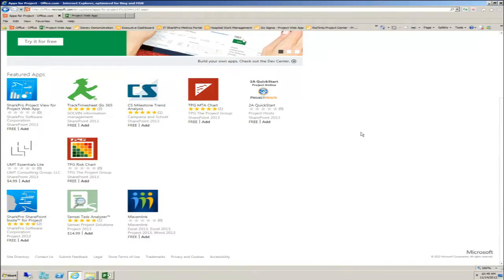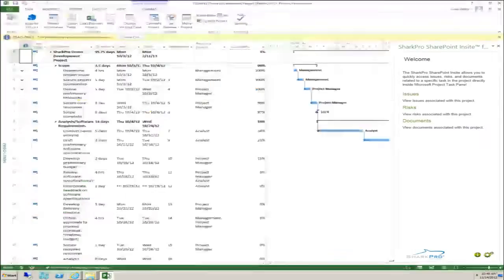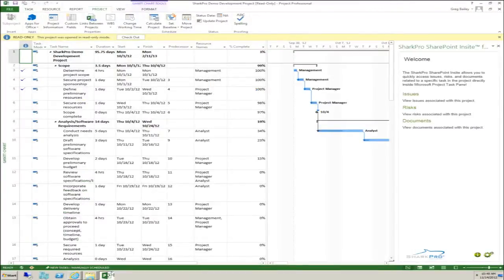They're too good, yeah. Okay, so you can very seamlessly copy these tasks to a SharePoint list, and then whenever you want to start scheduling resources or saving baselines and doing some reporting, you just press the button on the ribbon, and it will seamlessly open the project in Project Desktop. And that's exactly the scenario that Greg is addressing in their application.